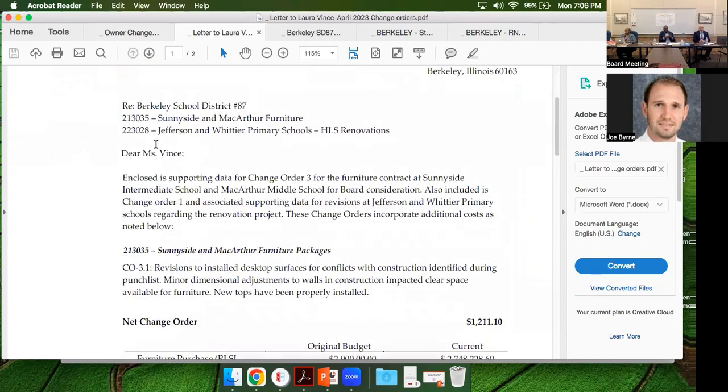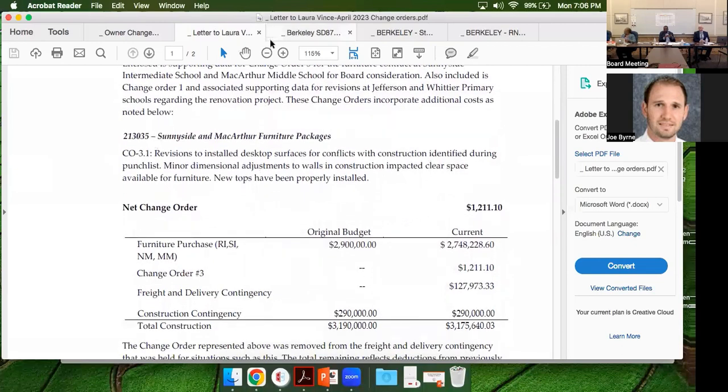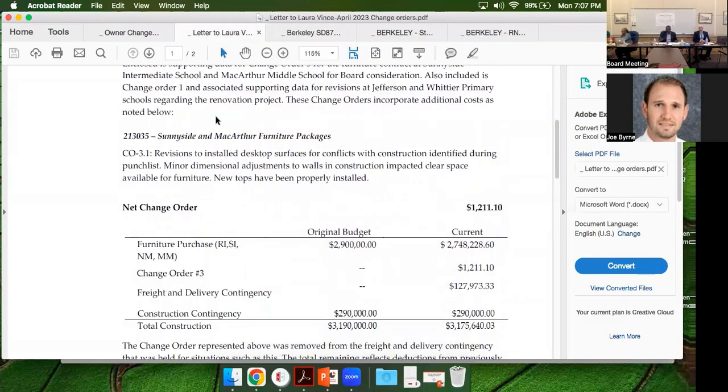And the final pricing on that comes in at $97,339. So that is going to add 9 additional poles to the site, 6 at the far south end, 1 right here at the north end, and 2 on the northwest side. It's also going to add 2 wall pack lights on the side of the building, and then it's going to shift 5 of the poles around to different locations on the site, reutilizing that, minimizing the new material that we had to order. So that is the first one for your approval, and that's PR 61.